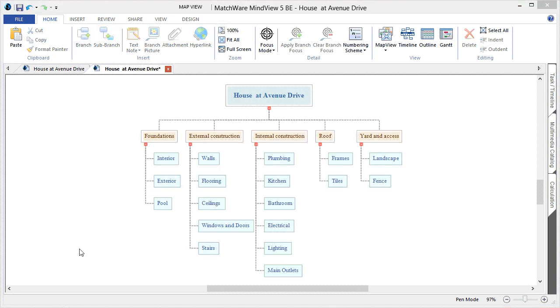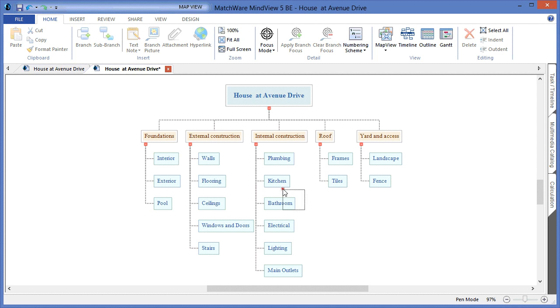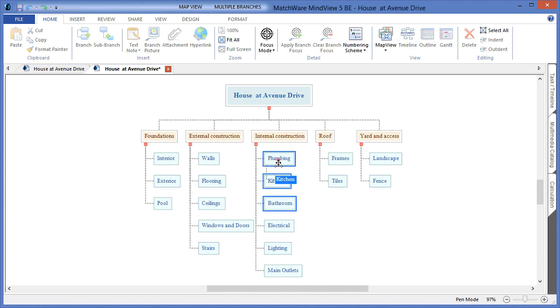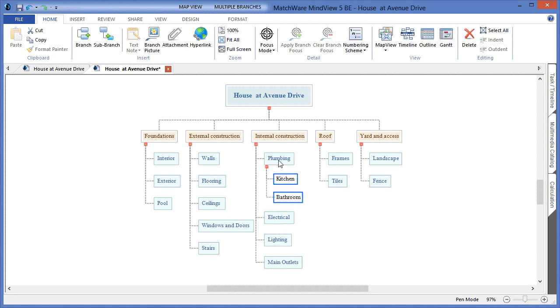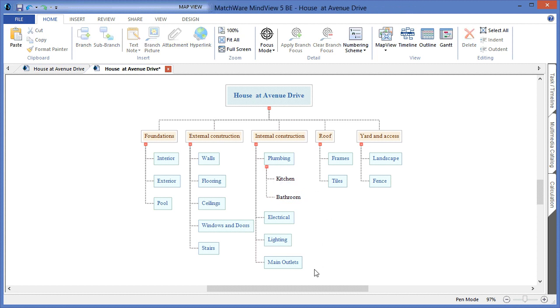Once I have created the main levels and structure for my WBS, it's time to start grouping the tasks into individual sections. For instance, we may want to group Bathroom and Kitchen under the Plumbing section. By left-clicking, I can drag those into that corresponding deliverable stage. I can do the same thing with Lighting and Main Outlets under the Electrical category.